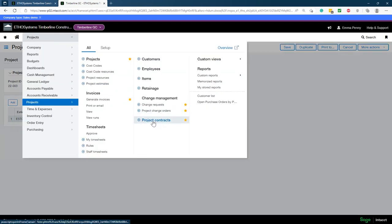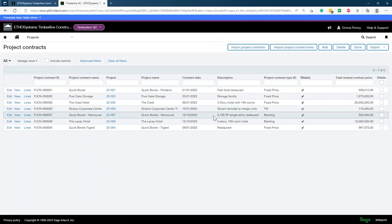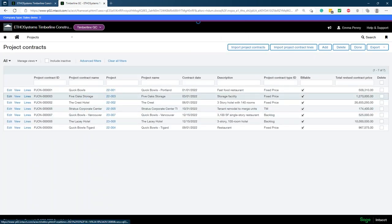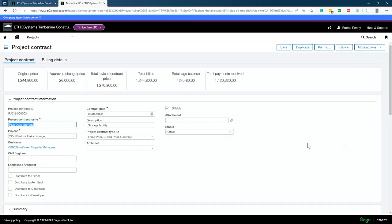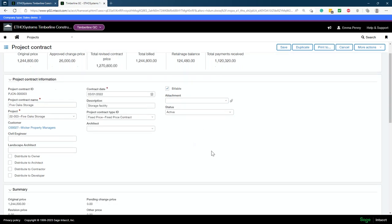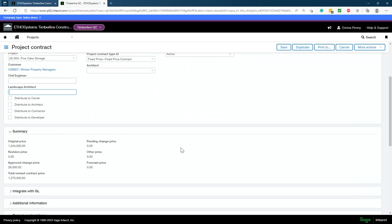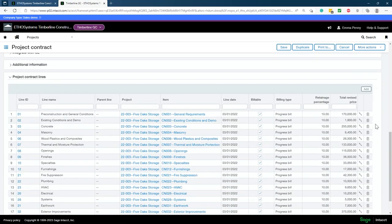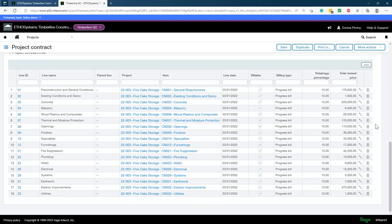For our projects, we also need to set up project contracts. Here is the Five Oaks Storage project contract. We have contract name, which contract to tie to, date, description, and the project contract ID type — whether it's fixed, backlog, GMP, T&M. We can set status, attachments, architect, civil engineer, landscape architect, and the project contract lines showing what items went into this contract, tracking retainage and setting retainage — all that for our contracts.